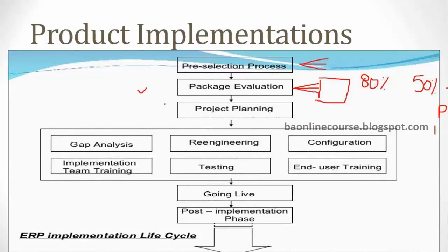Okay, so then you would go through the same process. You would start the project planning, wherein you prepare a detailed project plan. Okay, but the steps involved in the implementation would be a little different, right? So there is no requirements phase from the starting, right? So you're not capturing the detailed requirement right from scratch. So what you're doing is, out of your 100 features that you have agreed upon, right? 80 of them are already met, right? So only the 20 are what are not met by the product, right? So 20 features are not available in the system. So that is generally considered as gap.